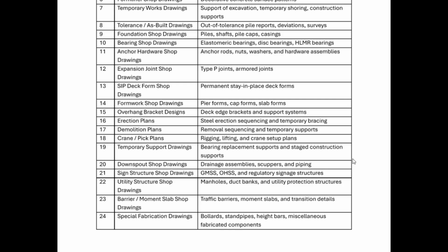For demolition plans, you can expect removal sequencing and temporary supports. Another famous one would be crane or pick plans. You can expect submittals or shop drawing related to rigging, lifting, and crane setup plans. Number 19, temporary support drawing. For this, you can expect bearing replacement supports and stays, construction supports. Number 20, downspout shop drawing.